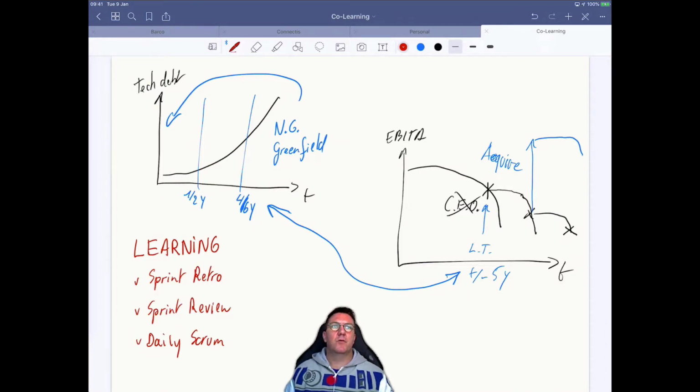Sprint review is a learning moment on really the future of the product. So with what we learned in this sprint, how does the future look like now? What do we need to change and add? So in sprint review, it's closing the cycle, the inspection on that cycle, and making sure that also things change in the product backlog. And that's the learning cycle in sprint review. If you don't see anything changed, meaning added or thrown away in the product backlog, then most probably it's not being used as a true review session, but more as a status reporting. But that's for maybe another video later on.